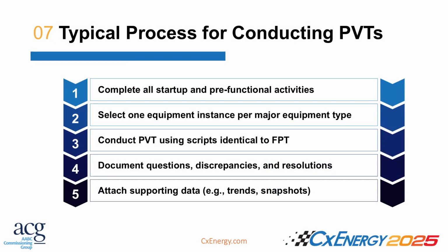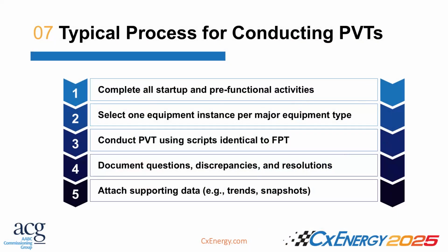So what is the typical process of conducting the pre-verification testing? Obviously, all the activities leading to the functional testing need to be completed. All the installation, pre-energization, startup activities need to take place.